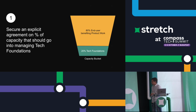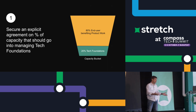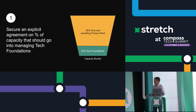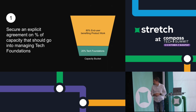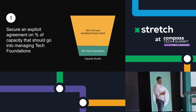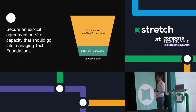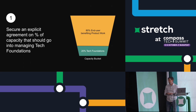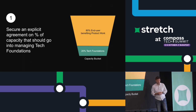So step 1: secure an explicit agreement with your business stakeholders, CEO, CPO, etc., on the percent of your engineering capacity that should go into managing tech foundations, managing tech debt. Think of your total engineering capacity as a big bucket. Have the discussion and arrive at an explicit agreement, and explicit is important, on the percentage that you're going to target that goes into the tech foundations. And I'll talk about how to make that argument in a second.